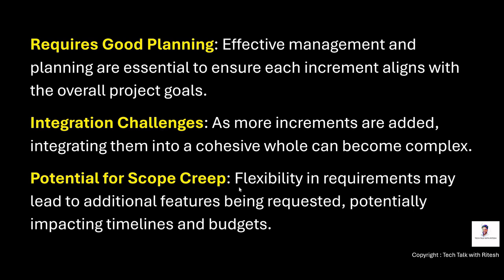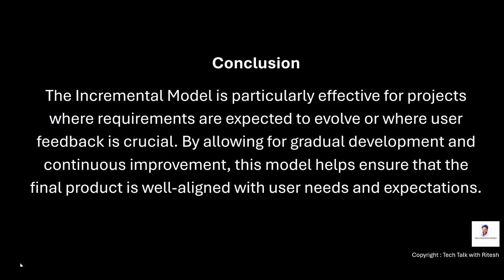One of them is the integration challenge. Potential for scope creep. Flexibility in requirements may lead to additional features being requested, potentially impacting timelines and budgets. So let's conclude the incremental model. The incremental model is particularly effective for projects where requirements are expected to evolve. So that is actually the case for 99% of projects.